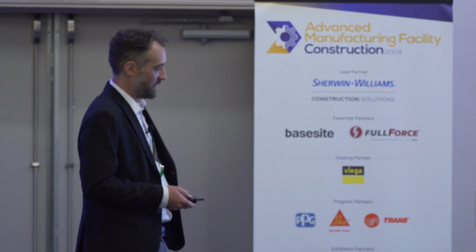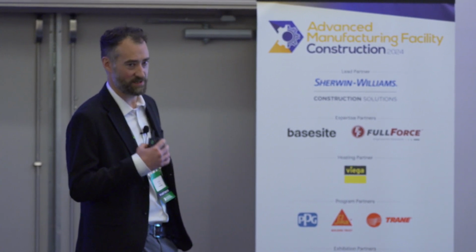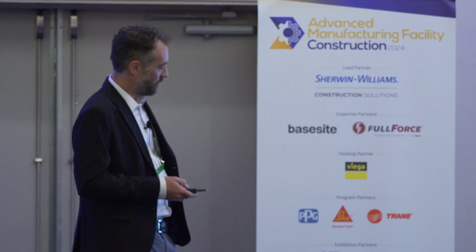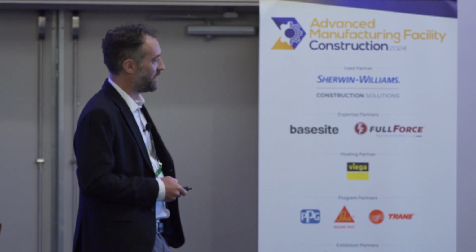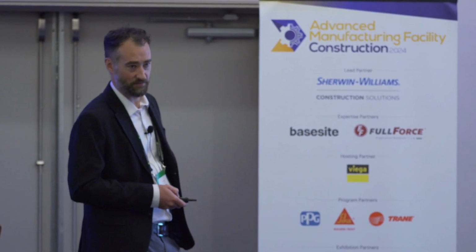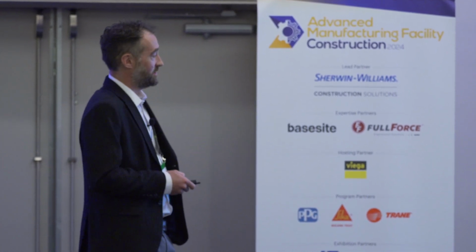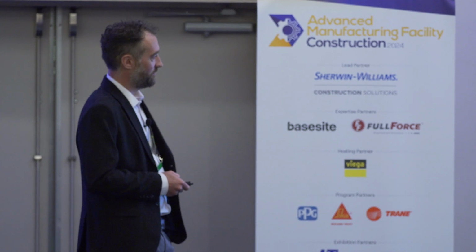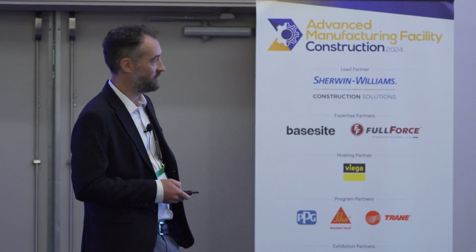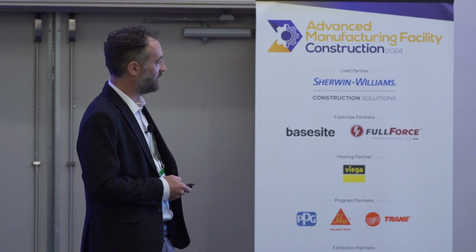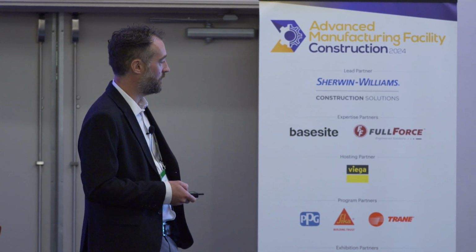This is just a little example of how these execution problems occur. These are quite understated, but if you've done a couple of these projects, you'll have known these pains before. What basically happens is we've got these 8 tools, and the plan was we were going to provide these 2 panels, and they were going to facilitate those 8 tools. But these tools got designed first, and they all came along and said, well, we like this panel the best because it's the easiest one to get to. And when it came to install this tool, there was no capacity left on this panel, or chem cabinet, gas cabinet, whatever it is.